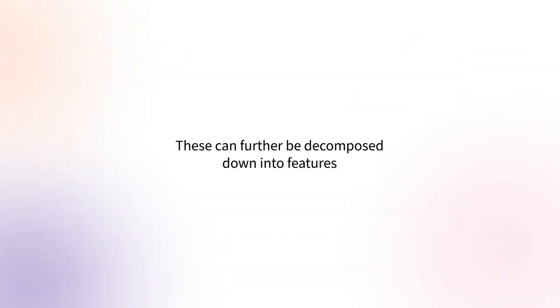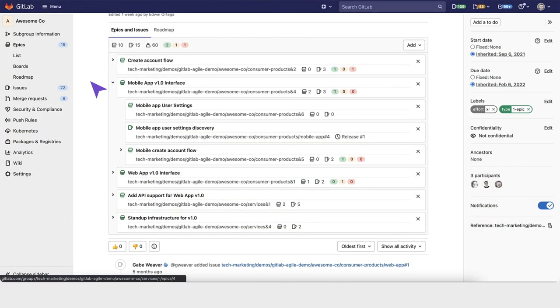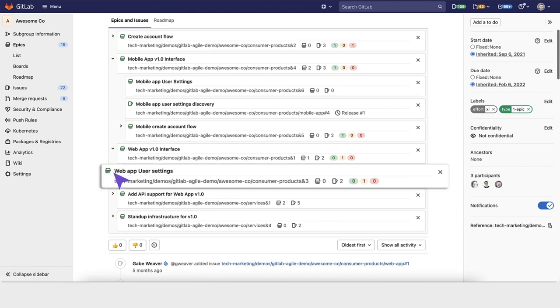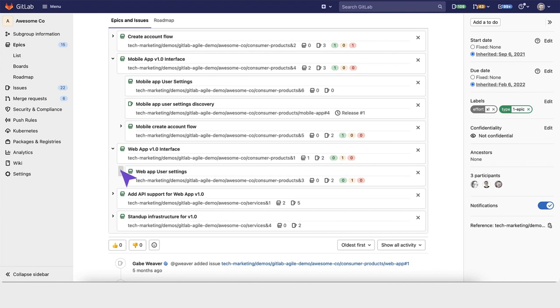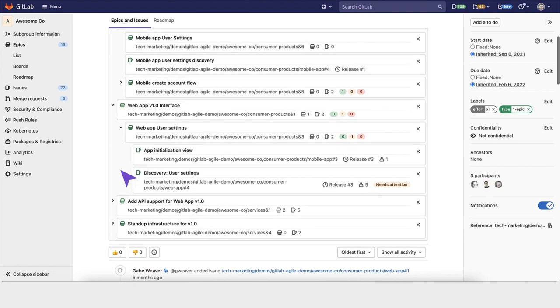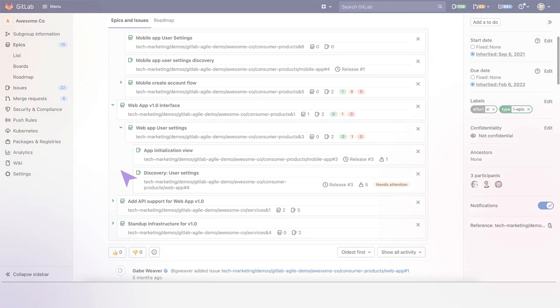These can further be decomposed down into features. The account flow needs to be created. Within that, some web user app settings need to be managed. Let's say that you want to decouple web app user settings from Create Account Flow.